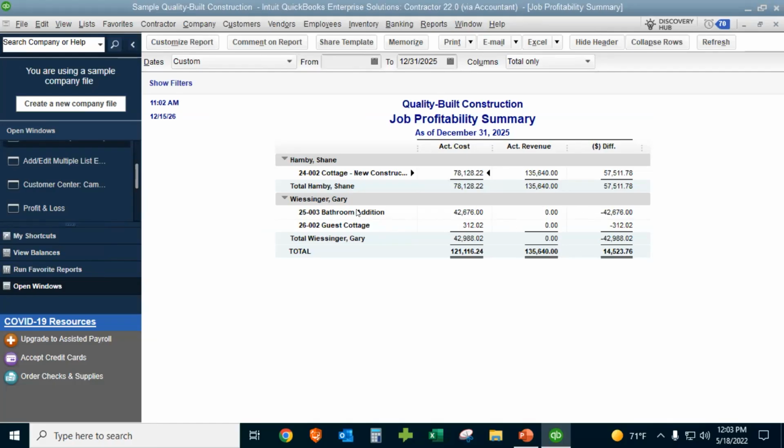Yeah, and when I'm assisting a customer with a year-end WIP schedule, these reports are vital, or else we have to start running pivot tables on GL data, and it can definitely take an investment to get there. Yeah. I mean, if these reports are tying out to the GL, that saves you a tremendous amount of time, right? Yeah, if you were able to pull this in progress and the previous closed, it might make the job schedule process take 30 minutes to an hour versus me spending maybe a whole day trying to digest the GL and understand what's open and closed during the year.